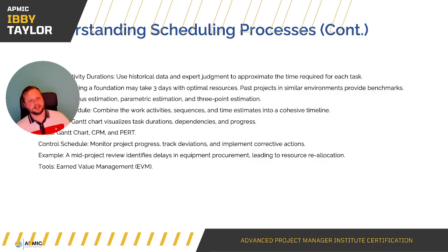Example there we go. Digging a foundation may take 3 days with optimal resources. Past projects in similar environments provide benchmarks. Analogous estimation, parametric estimation and 3-point estimation are tools that you can use.